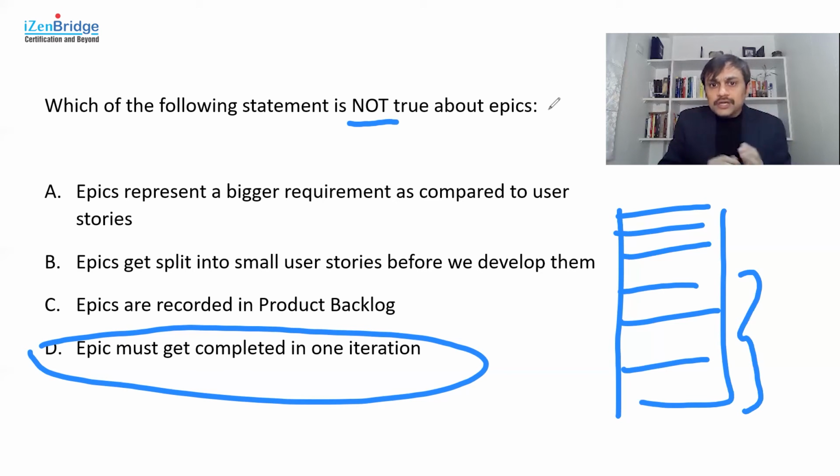So I should not be creating a very refined, detailed product backlog 3 months in advance or 6 months in advance. Because if I do that, whatever I have worked on this week or next week or 2 weeks together, and I discover some learning, I am not including that learning. So I do it just in time, and we can identify what is the just in time rigor for a given project. So incrementally, we are expected to split these epics into small user stories and get the things done.